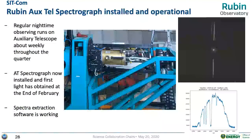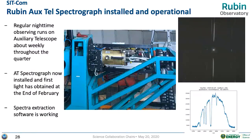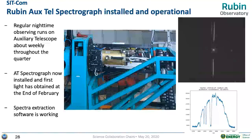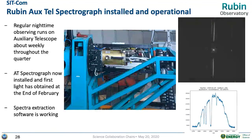The AuxTel spectrograph has been installed as part of that system test. We are getting data from it, and Merlin and company including Robert Lupton are actively working on the software to analyze the data. The performance looks good. Technically I would call the system operational; the next step is extracting the spectra and converting those spectra into the calibration data product of the atmospheric transmission function.